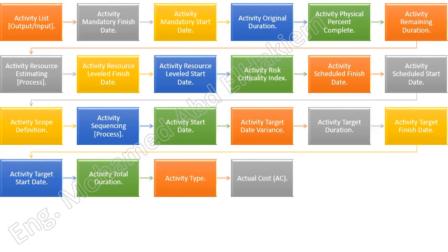Actual cost can sometimes be direct labor hours alone, direct costs alone, or all costs including indirect costs. Also referred to as the actual cost of work performed, ACWP. See also, Earned Value Technique, EVT.